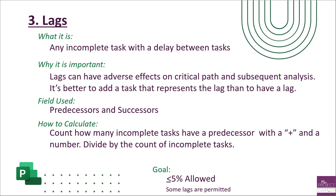Recap on lags: a lag is an incomplete task that has a delay between two tasks, and those lags can have adverse effects on the critical path — so we want to avoid them as much as possible. We're looking at the predecessor and successor columns. Calculate how many have a predecessor or successor with a positive sign, then divide that count by the number of incomplete tasks. DCMA allows no more than five percent of your schedule to have lags.